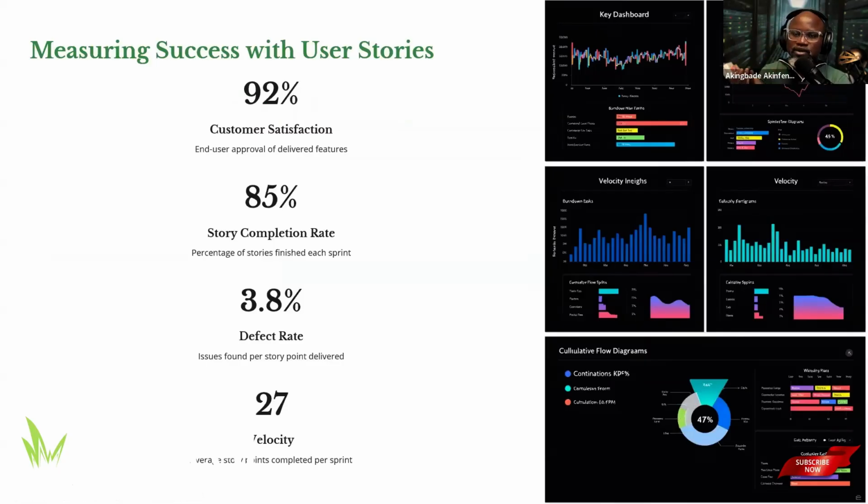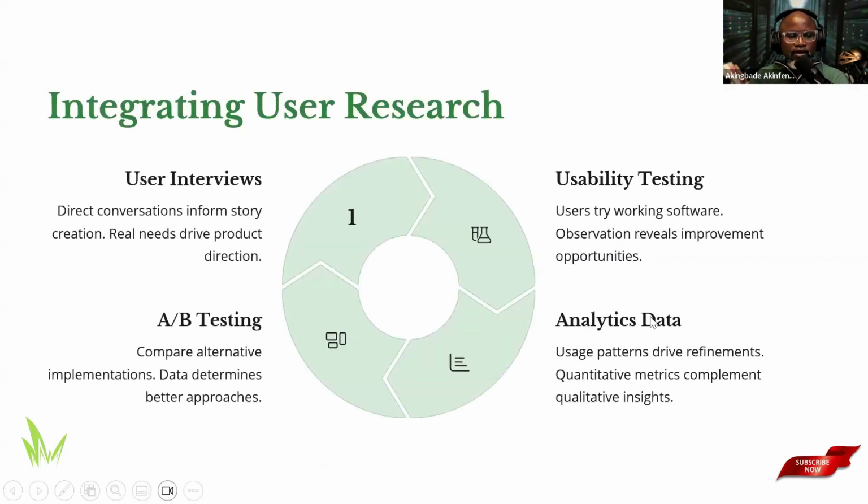If we have 5 stories, for example, that we bring into sprint one, the first story might be 3 points. If each one of those stories is three, it will be 3 times 5. That's 15. So that's the way we check the velocity. If you keep doing 15, 15, 15 for every week, then your velocity would be the average of how many stories you bring in weekly. So that will be what your velocity is.